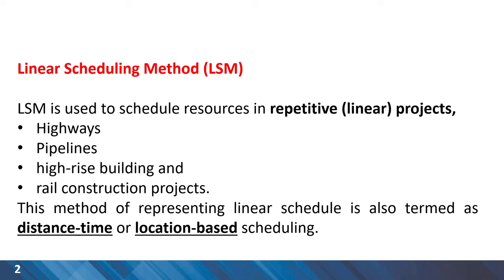LSM is a very useful concept for repetitive or linear projects such as highways, high-rise buildings, pipelines, rail construction, or even tunneling. This method for scheduling is also called distance-time scheduling or location-based scheduling.